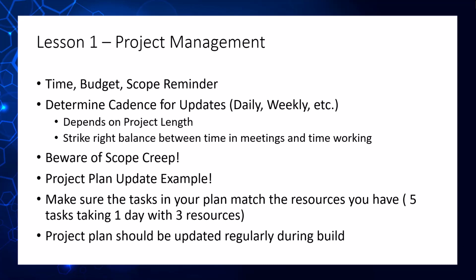So just keep in mind that these things are going to happen, and you'll want to think through what the alternatives are. So if you run into an issue and it's going to take longer to do than what you thought, taking more time is also going to require extra budget, especially if your team is being paid hourly or daily. If it takes more time, it's going to cost you more money. So be prepared for things like that.